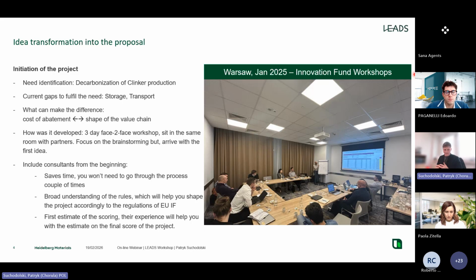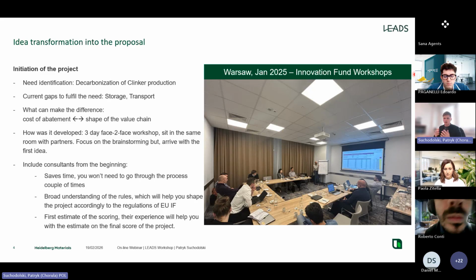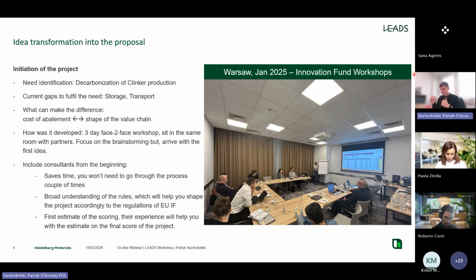And at the end, we exercised a small activity where we had the first estimate of the scoring, because you can do a rough estimate of how much the project itself would cost, what will be the scoring on the financial aspects, how your project stands in terms of the state of the art technology. Is it a unique approach? Is it something which maybe is done somewhere else? As well as there is a first glance at the permitting process, the timeline, and so on and so on.